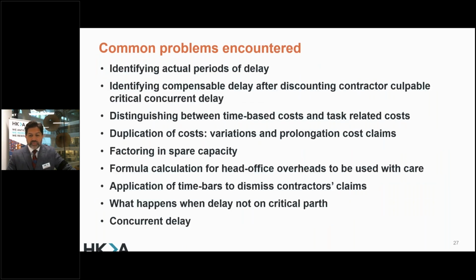The common problems, just very quickly before we move into disruption, common problems that are encountered. The situation actually becomes more complicated when the contractor suffers delays to areas of work that are not on the critical path. Such a delay would not entitle the contractor to an extension of time, as the completion date would have not been delayed, and therefore prolongation costs could not be claimed.